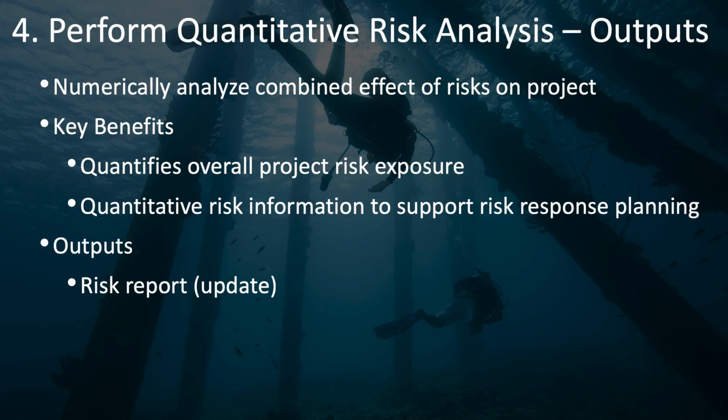The benefits of this are that it quantifies your overall project risk exposure, and it provides quantitative risk information to support your risk response planning later on. The results of this quantitative risk analysis are added to your risk report, and this is your one and only output of the quantitative risk analysis.